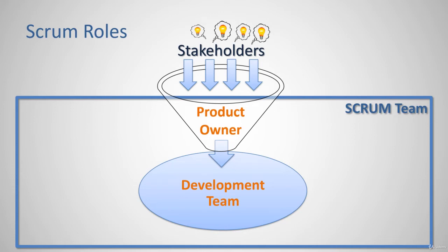The only one that can tell them what to do for the product after a discussion and agreement is the product owner. This doesn't mean that the development team cannot talk to the stakeholders. The product owner can promote collaboration and discussion between them so the team better understands the problems. But the stakeholders cannot tell a team member to make a change or give priority to certain features. If that happens, the stakeholders should be just sent back to talk to the product owner. The product owner is the only one who can take decisions about the product.